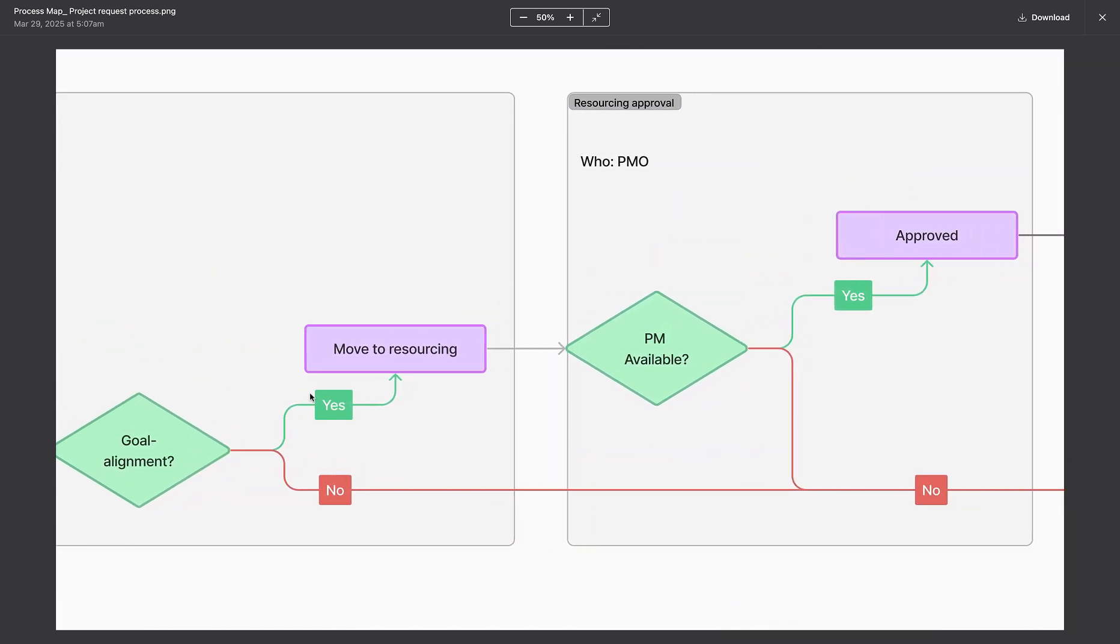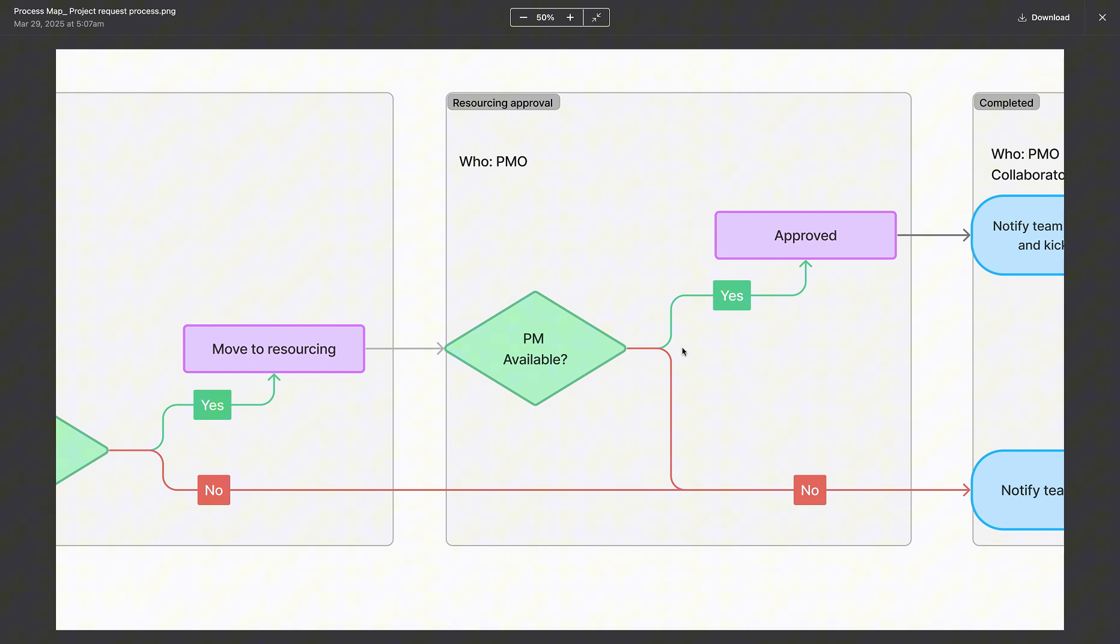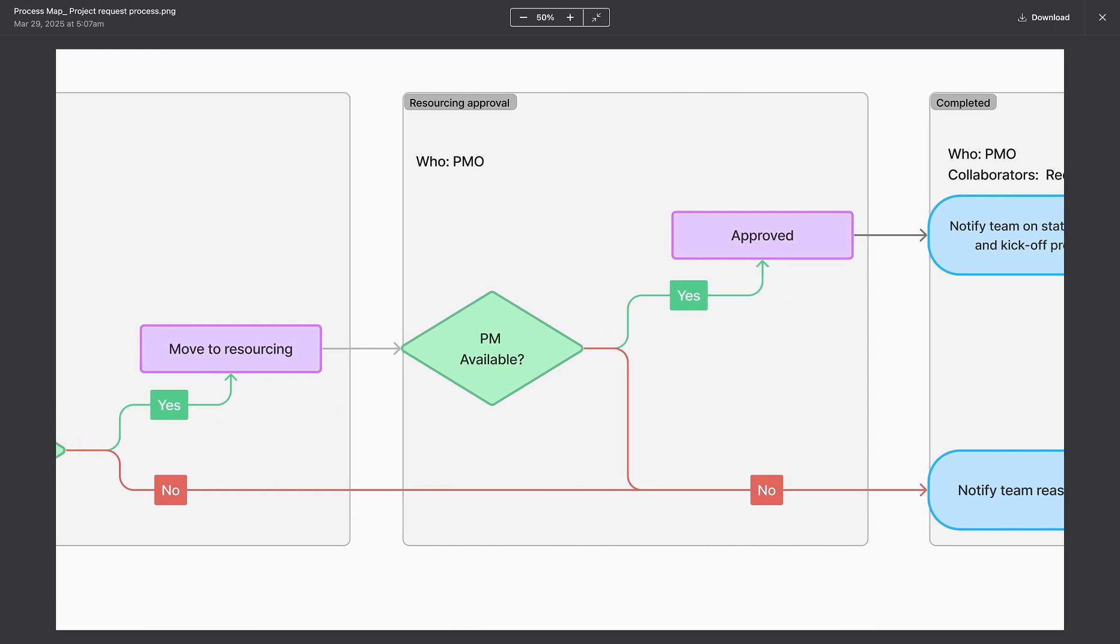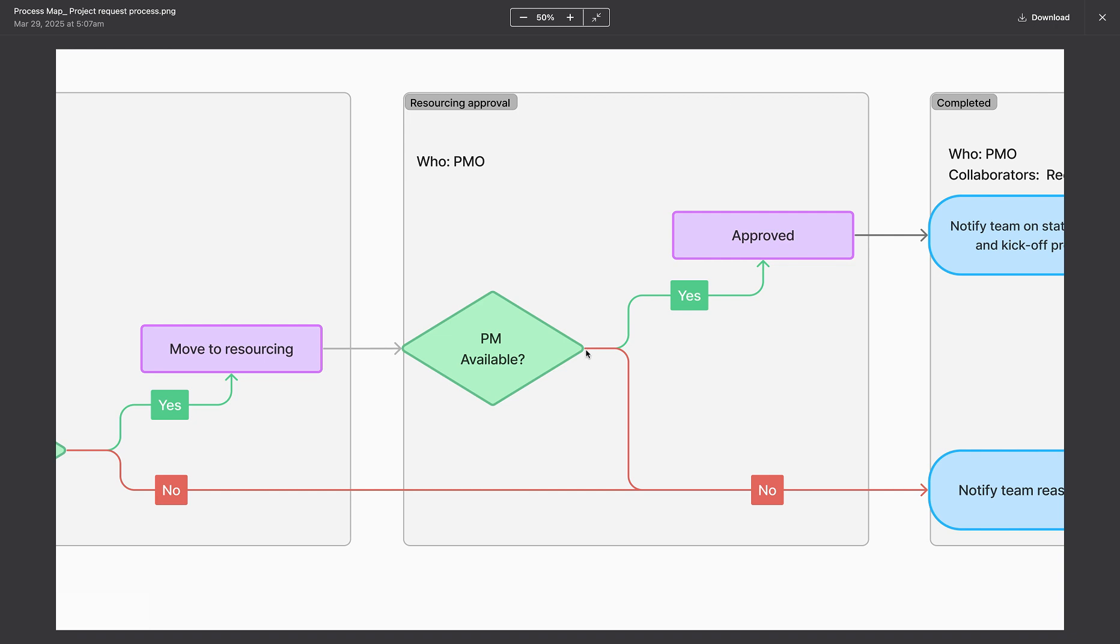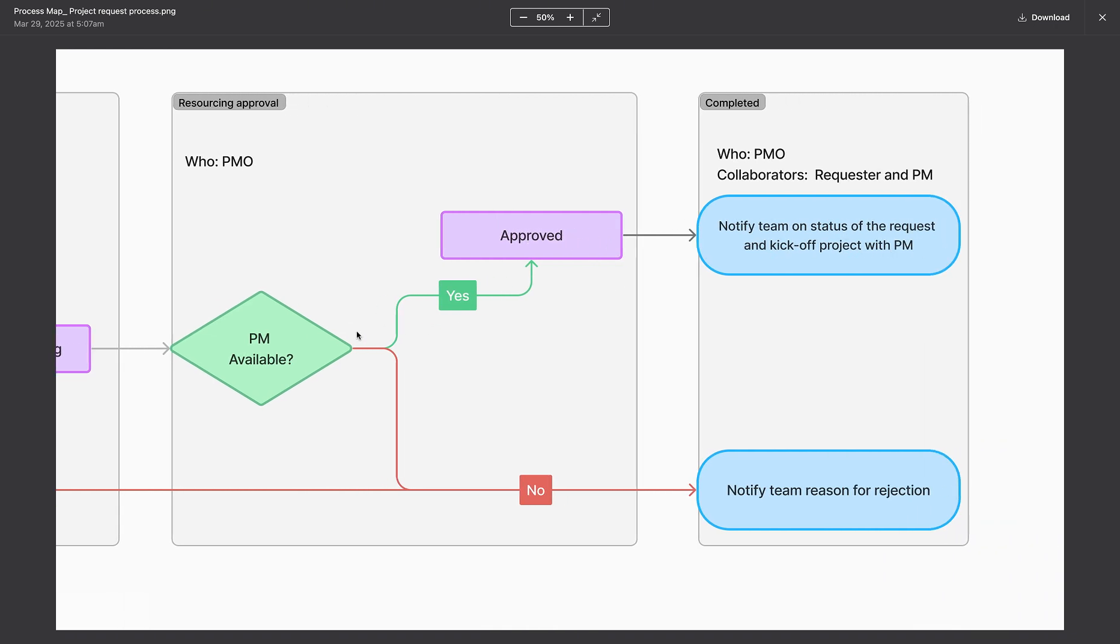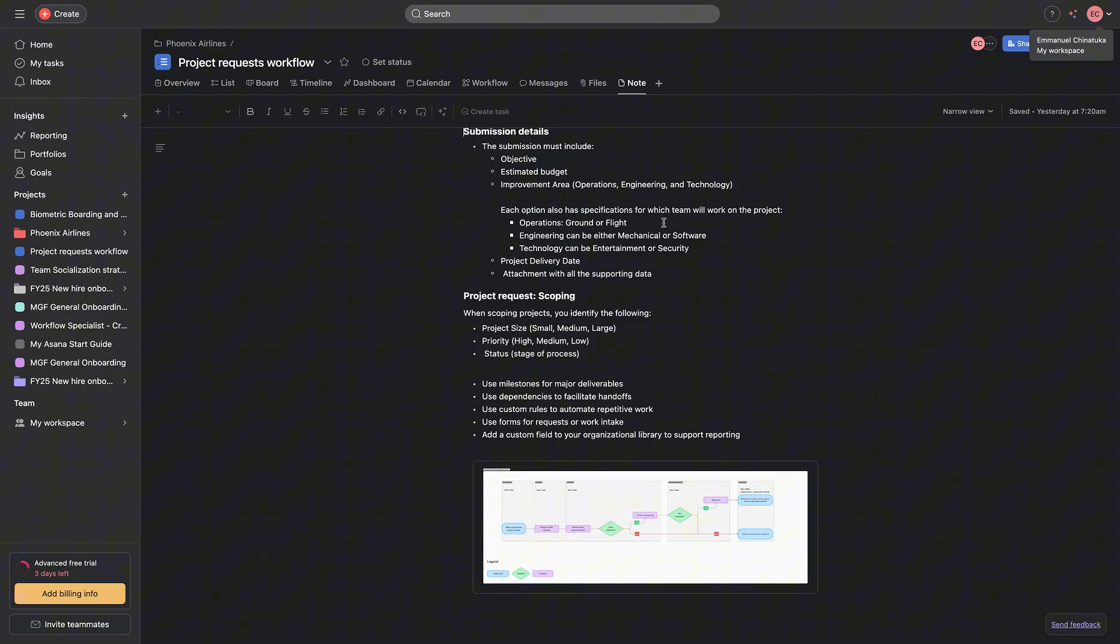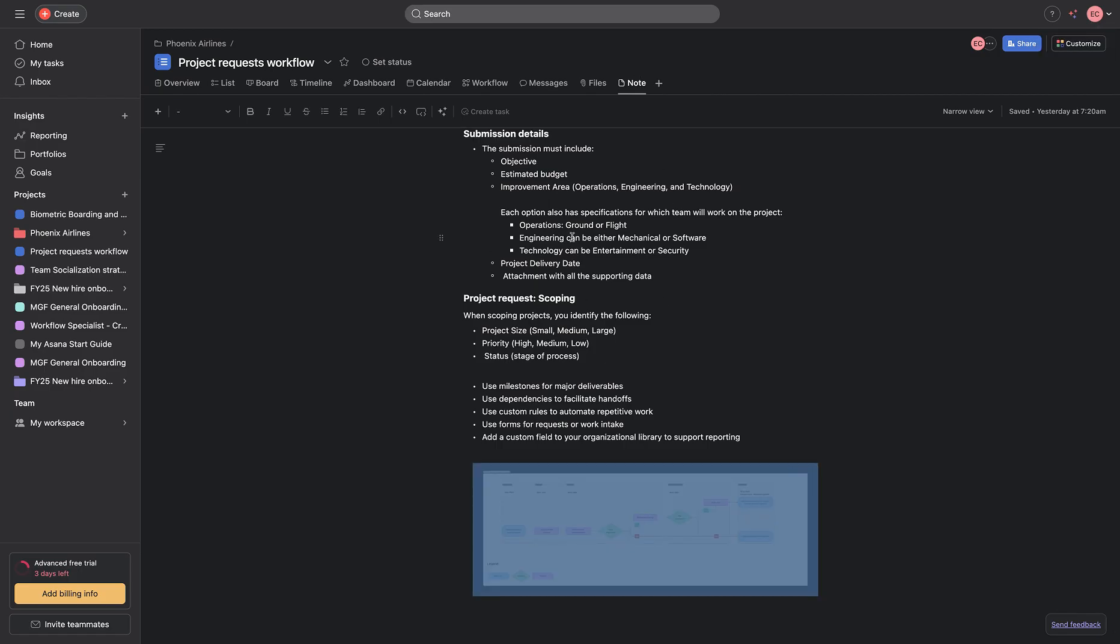After we've moved it to the next step, we figure out if we have an available project management to pick up that particular project. If we do have a project manager available, the project is approved and the project is kicked off, just like we kicked off the biometric onboarding and security project. Else, if that particular project is not approved, it is rejected and reasons are provided to the approvers. That is the design for this particular workflow and we will be automating this.